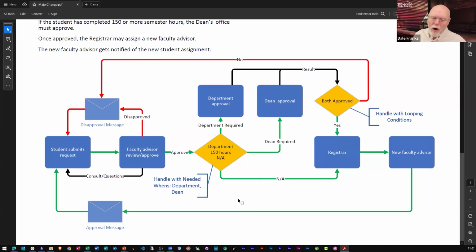So the drawback to the process timeline is that it hides a fair amount of complexity from the graphical representation. The drawback to the traditional flowchart is that it hides any sort of relationship to the amount of time that the process is going to take.